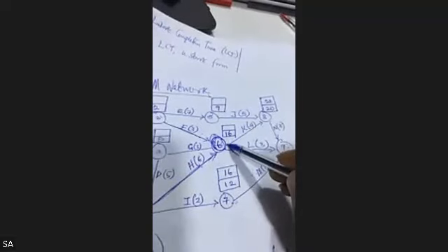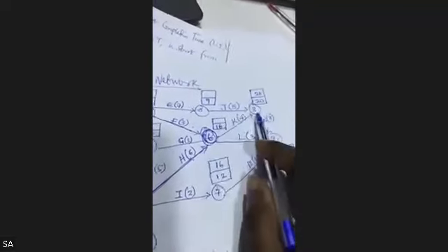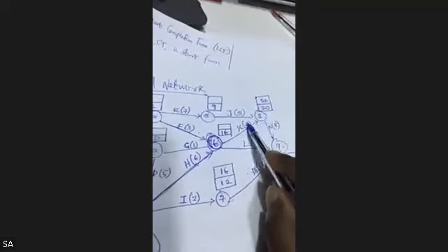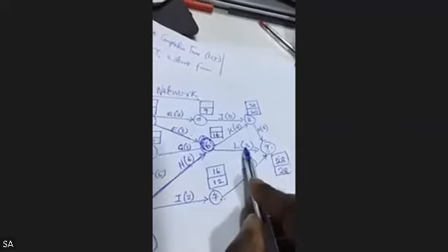I'll now ask myself, how many arrows lead to node 6? This is node 6. We have 6 to 8, 6 to 9. It's just 2 arrows. Is there another arrow that leads to node 6? Backward. So 20 minus 4 gives 16. But 28 minus 3 gives 25. Which one is the least? 16. So I'll pick 16.